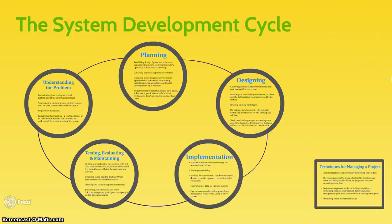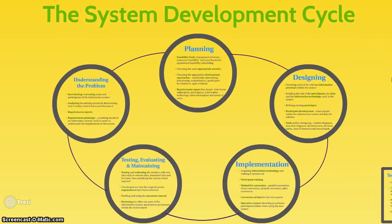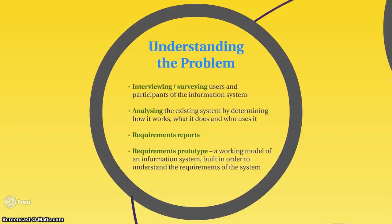The first stage is understanding the problem. We have to fully understand what exists in the current system. This means interviewing and surveying participants who use the current system, analyzing how that system works, conducting a requirements report, looking at what parts of the system need to exist in a new system, and sometimes making a requirements prototype — a similar system we can modify to better understand what's already working.